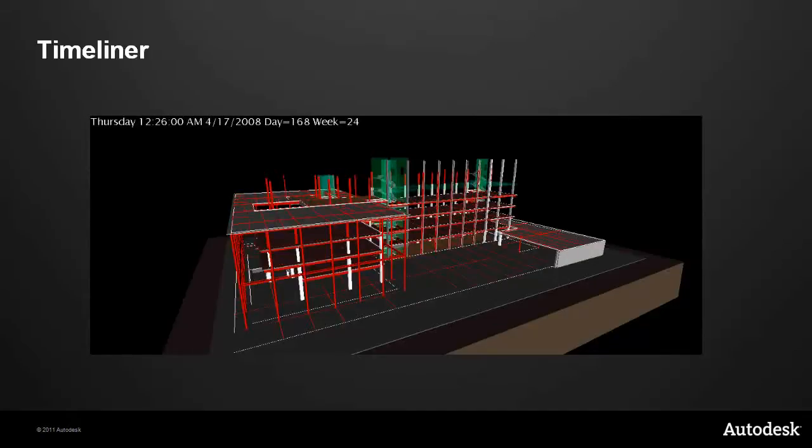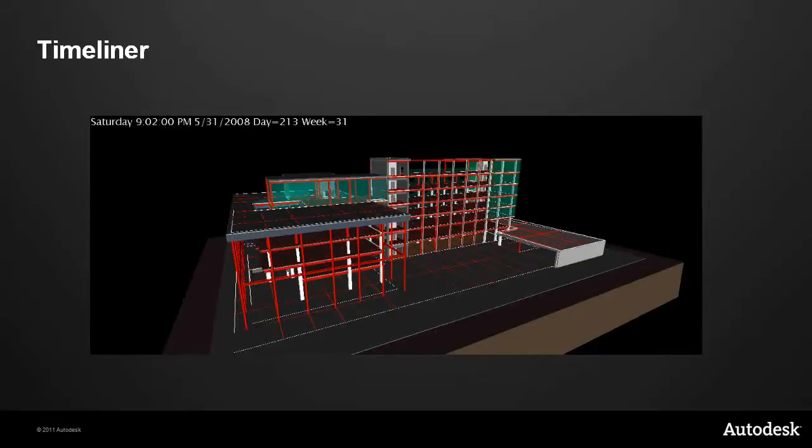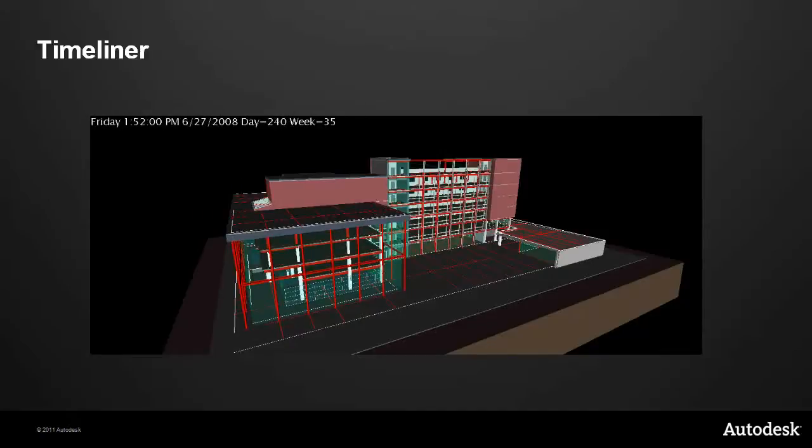This is not just a movie for presentation. You'll actually be able to compare the projected time scale with the actual, so you can be monitoring the construction as it's happening, or you can be using it as a tool to see if you can't move activities around to save time, because you get kind of a big picture in a Gantt chart that lets you see where maybe something could be moved up in the time frame because it doesn't have dependencies on other activities.